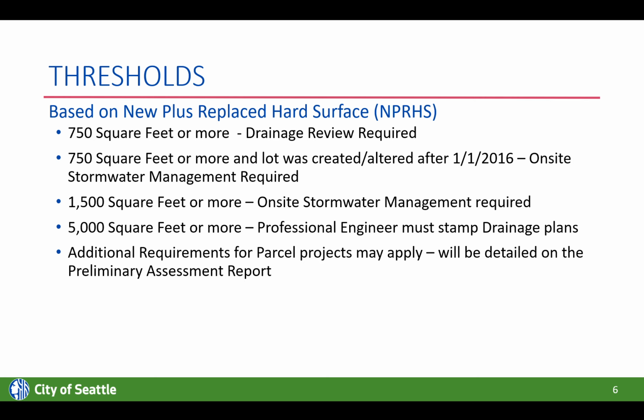1,500 square feet or more is when on-site stormwater management is required. And we'll go into a little bit more detail about on-site stormwater management in a separate presentation that is titled 1500 projects with 1,500 square feet or more new plus replaced hard surface.